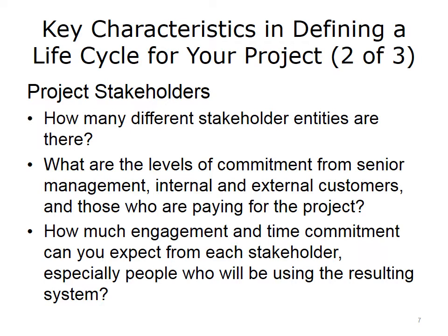The people on the front lines, the nurses and doctors that are going to be using your system, generally do not have a lot of time to view the product because of their responsibilities to their patients. You need to make sure that you allow plenty of time for multiple people on each stratum to review the system, because they may bring back wonderful suggestions and changes that you might want to incorporate in your system.